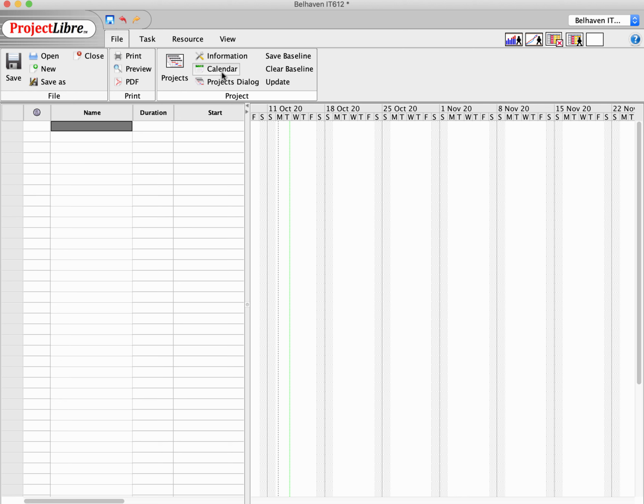But let's say that you have a unique situation, and I know some companies that do this, where employees work 5 days one week and 4 days the next, often called 9/80s. So they work 9-hour days for 9 days, and then the 10th day, every other week, they have it off. So they get every other Friday off or every other Monday off. Also, you could have a situation where people work an unusual calendar, because the kind of work that they do might be a second shift, or they might actually be doing a 10-hour day on a regular basis. Now that would be a little unusual, but still it is possible.